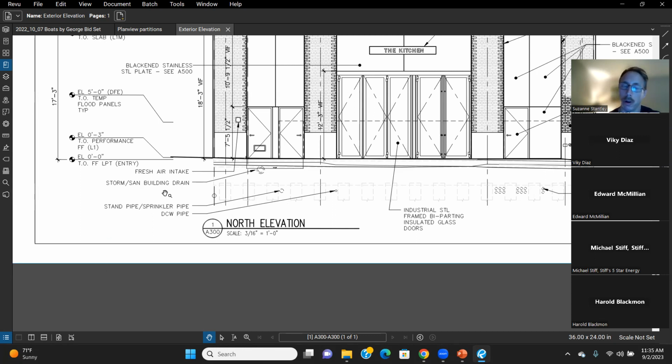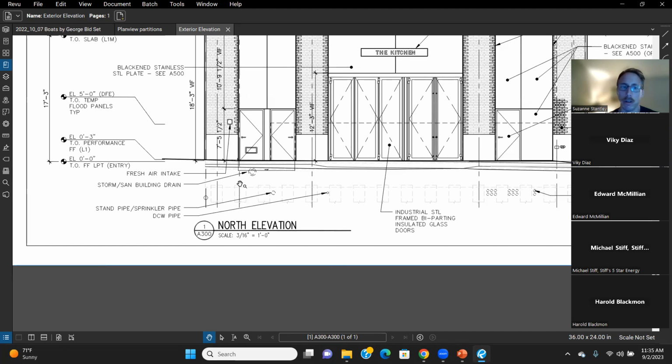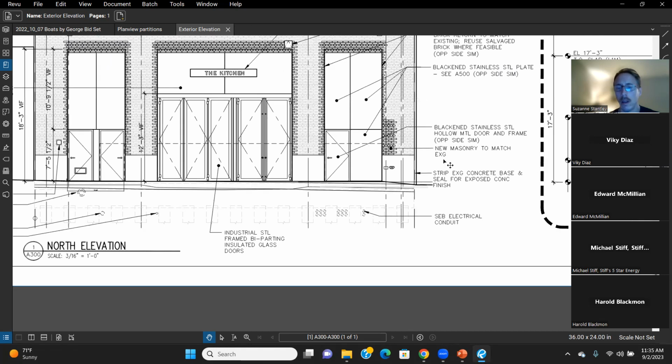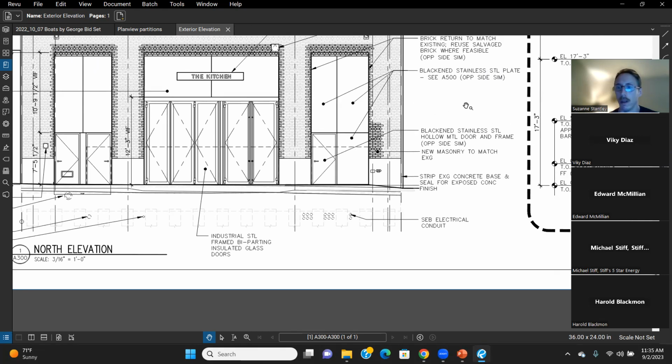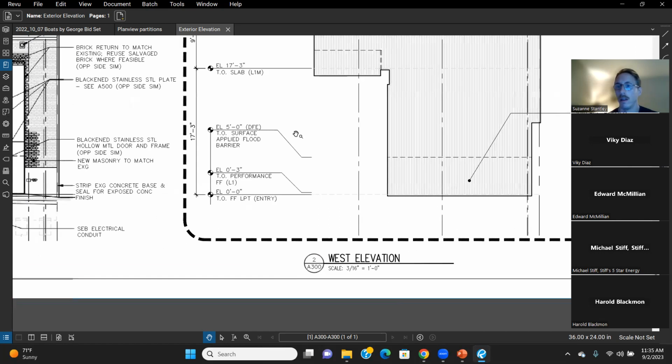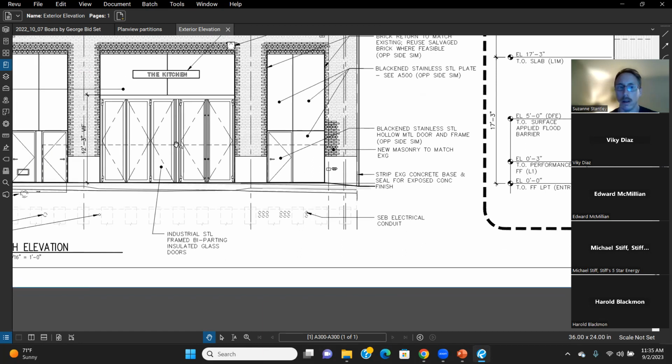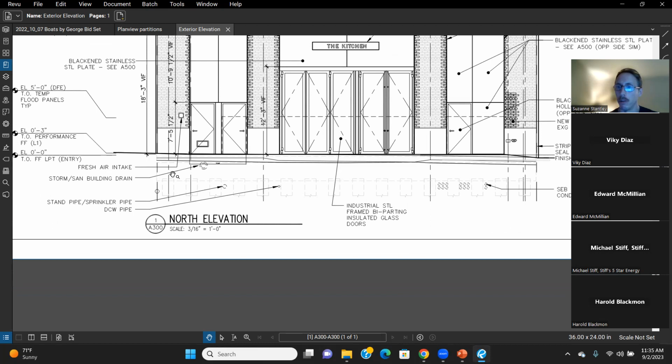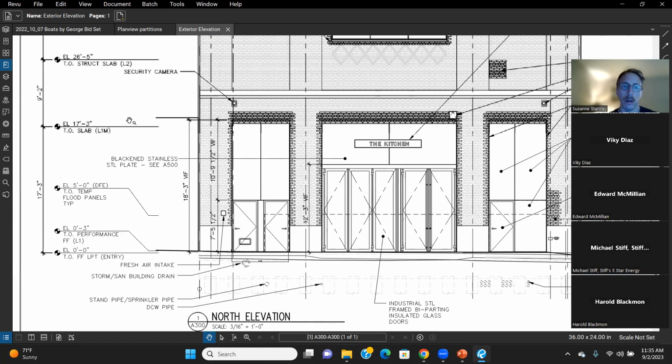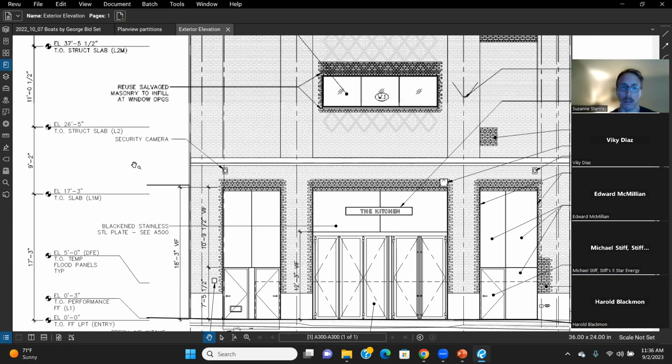If you are reviewing a plumbing drawing and they didn't include anything below slab, and you're a GC or they're under you in some way, you might stumble on this drawing and bring it up: well, the elevation shows there's sanitary pipe under the slab. And a check for yourself if you are the plumber and somehow in the plumbing drawings you went through the whole thing, didn't really see anything below slab, but then you check on this just for fun, just to double check, and they're showing something. So you go back and double check and make sure that this drawing is wrong and not your plumbing drawings. Because again, engineers and architects do make mistakes all the time.